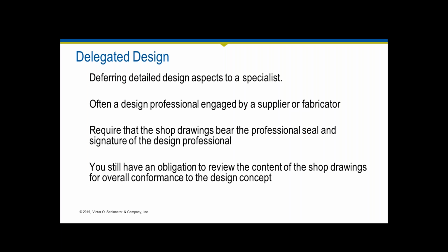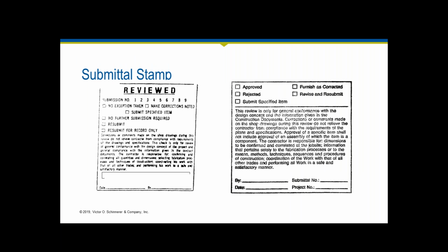You will still need to provide sufficient information in your drawings to be able to pull the permit from the authority having jurisdiction. So again, you can't just say, oh, we're just delegating the whole design to the contractor. That wouldn't work in the design-bid-build environment. But delegated design is indeed part of the toolbox that you have. Again, you need to look for exactly how this solution works with your concept, and you're still obligated to review that solution. Even if there's a licensed professional who stamped and sealed it as the person providing these services, you still have responsibility for that. So act accordingly.